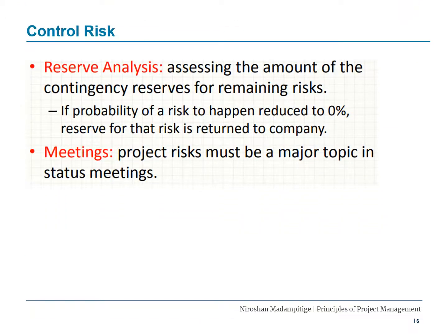Reserve analysis. Assessing the amount of contingency reserves for remaining risk is known as reserve analysis. If the probability of a risk happening is reduced to 0%, the reserve for that risk is returned to the company. Meetings. Project risks must be a major topic in status meetings.